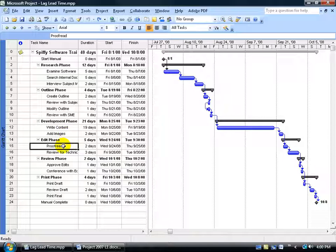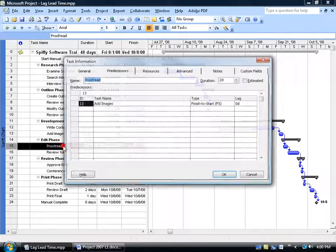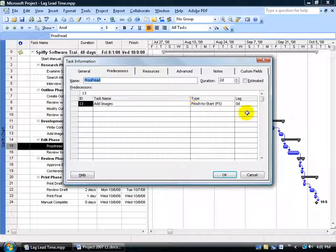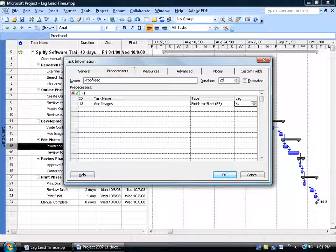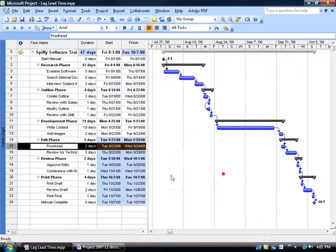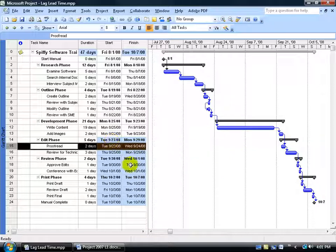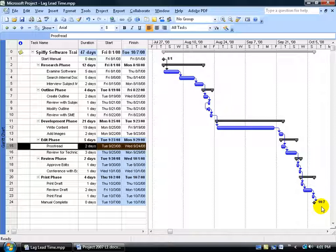So I go to the successor here and double-click. Again, you're coming to the predecessor tab to the lag field. What makes it a lead field is typing in a negative number. So if I do negative one day and hit enter, click OK, it now pulls it back this way one day. And you can see everything's highlighted, what it affected - my change here to a lead time of one day. So where the project used to finish on October the 8th, it's now finishing one day earlier.